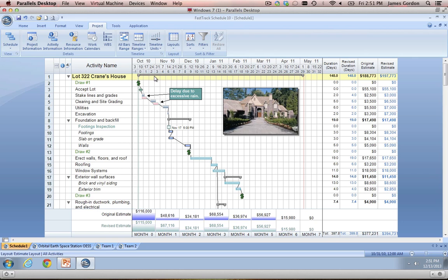The Activity Name column is where you're going to be creating the task list in your project or projects. As you can see, our overall project name is Lot 322 Cranes House, and then these first couple tasks are actually indented underneath that overall project name — we have Draw Number 1, Accept Lots, Stake Lines and Grades, etc. As soon as we get down to Foundation and Backfill, you'll see that we actually have an additional indentation creating a separate phase, with subtasks like Footings Inspection, Footings, Slab on Grade, and Walls. We'll go over more about how to set up these different outline levels when we're building out a schedule from scratch.